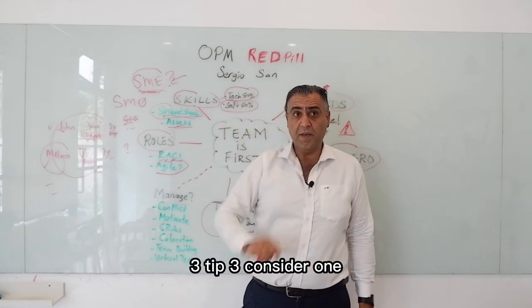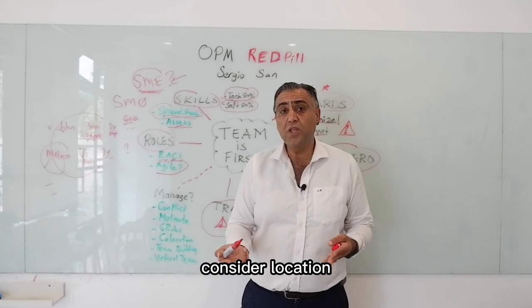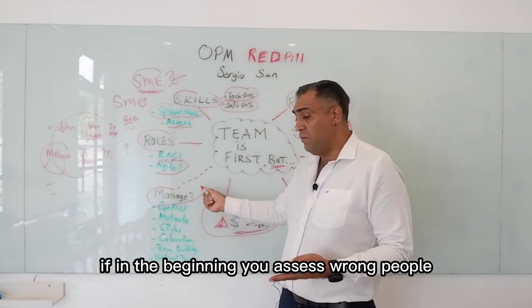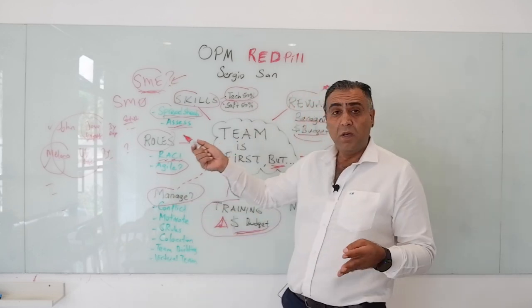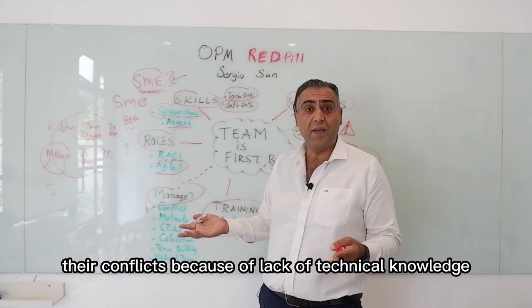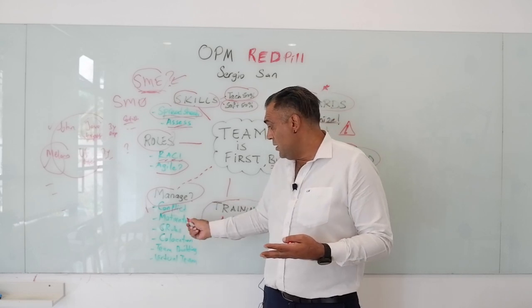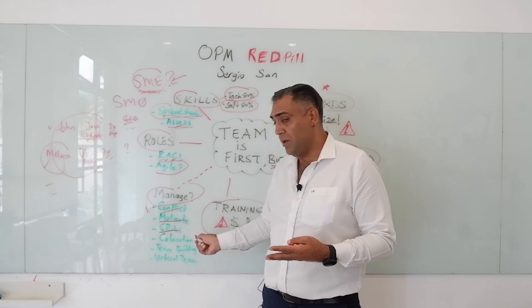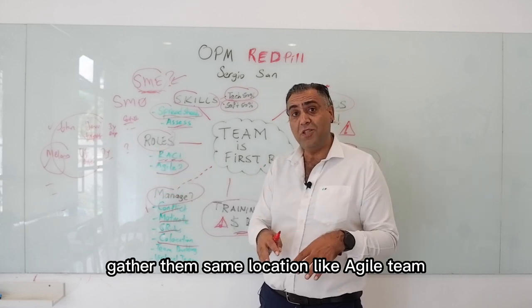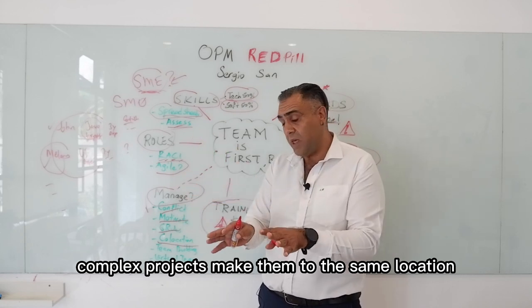Tip three: when assigning responsibilities, consider time zone, location, and communication needs — how to manage people is very effective here. If in the beginning you assign the wrong people or wrong skills to your project, you cannot manage their conflicts — whether due to lack of technical knowledge or lack of soft skills. Co-location: gather them in the same location, like in Agile. For complex projects, make them be in the same location — this is a technique for managing the team.